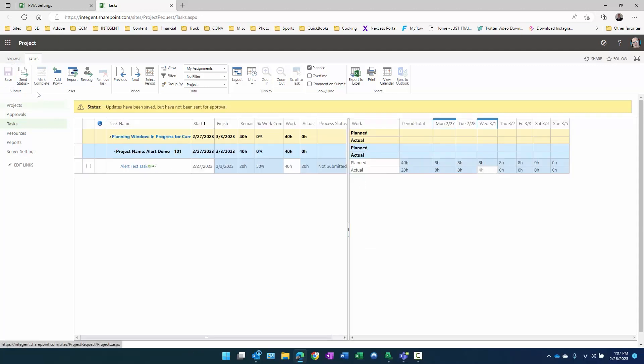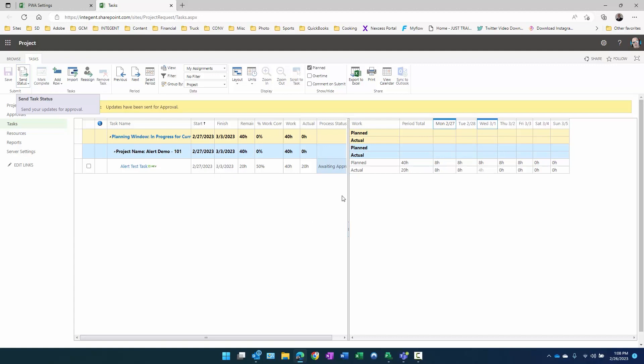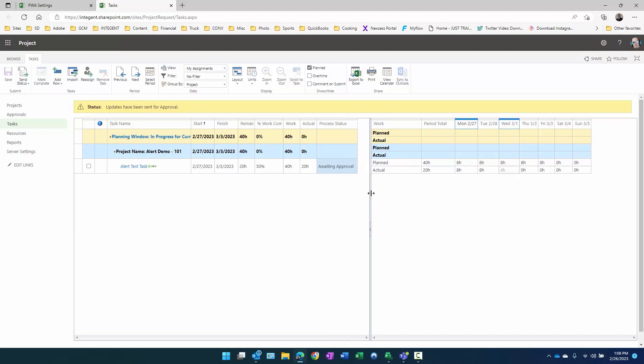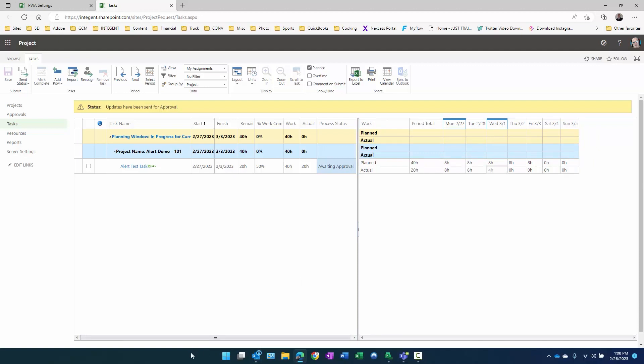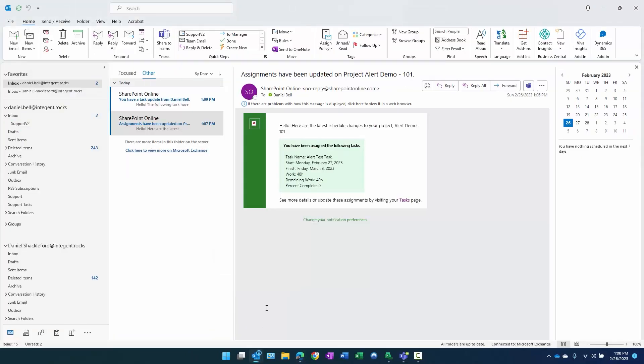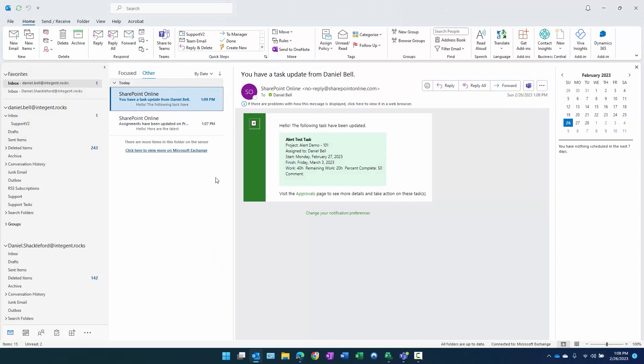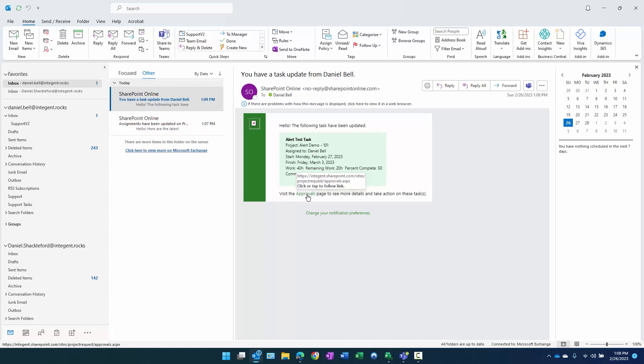Now what I can do is I can send status for this. What's going to happen is since I am also the approver being the project manager, I will get a notification saying that this task has been submitted by the team member. Click on this link in this notification to review and approve it. And there is the notification. Hello, the following task has been updated: alert test task, alert demo assigned to Dan Bell, start, finish work 40 hours, remaining work 20. That's because we updated percent complete to 50%. Visit the approvals page to see more details and take action.